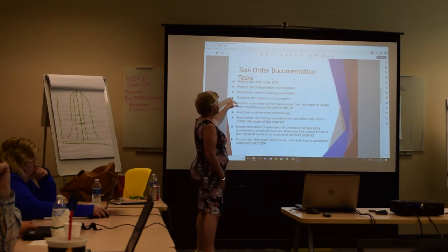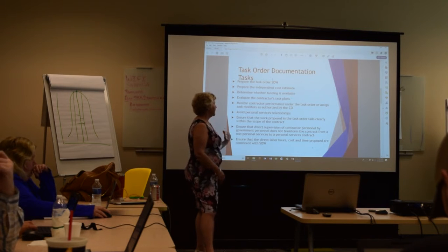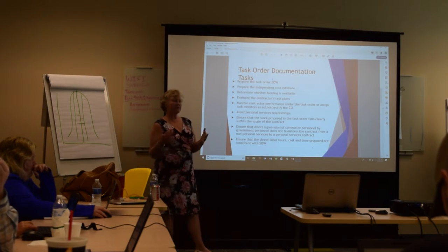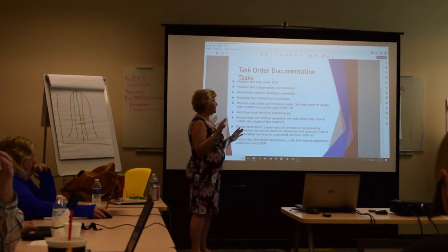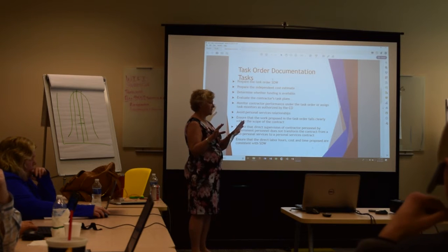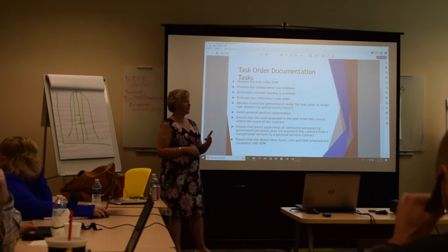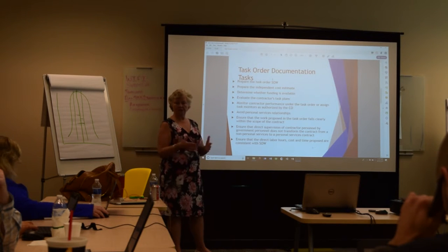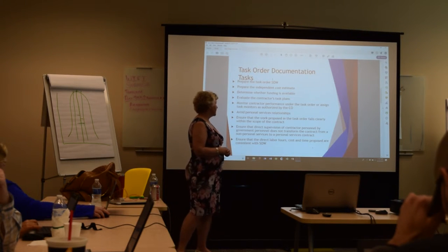So then they determine whether funding is available. Once they do that reconciliation, they evaluate your task plan, in other words, what milestones you have identified for getting this task order work done, and then they monitor your performance against that task order to make sure that all the work is being done according to specification. And that can be one person or multiple persons, depending on how big the task order is. If the task order is located in different areas, you're going to have different task order managers.